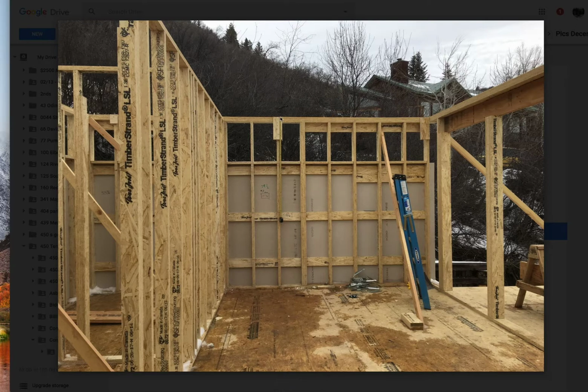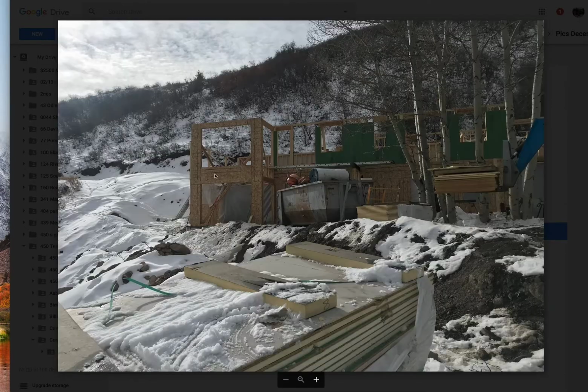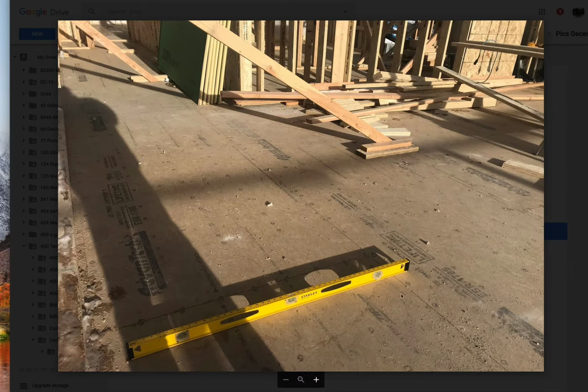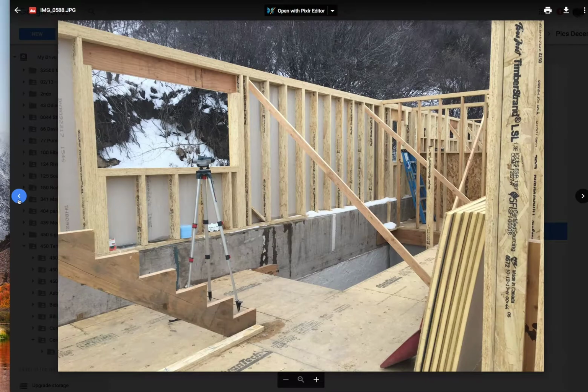Those were our change orders. This is me going through and testing all of our elevations. I went through and triple checked them and then squared, made sure all of our walls were squared off. And then I went through and did basically a takeoff of everything. So from our reclaimed wood up here to our stone down here to all of our cedar going on the 3rd floor, going through and confirming how much flooring we need, how many windows we have, and then the change orders that we've had, so what size windows we're going to be ordering, and so on and so forth. So I went through and confirmed everything. You can see the transit there. That's me squaring off all the change orders.